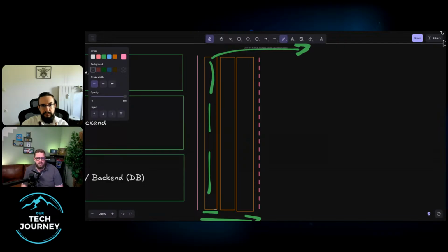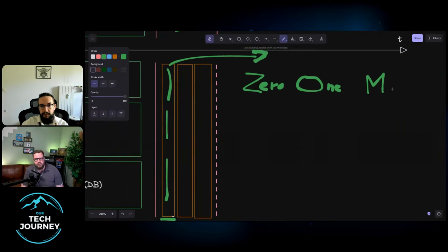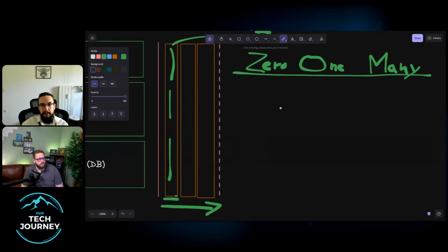But I wouldn't recommend to already implement everything of those other things, because there is most of the time the tendency that one part is developed faster than the other part. Which means that this part will always be faster than the other. And that is not very good. So one of the strategies is this 0-1-many.